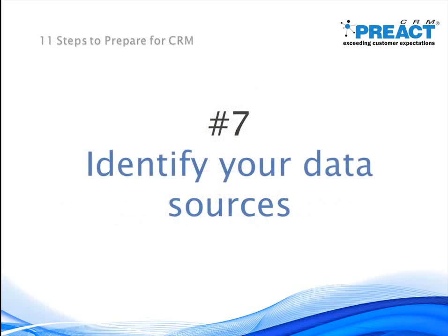Step 7. Identify your data sources. In our experience, by far and away the biggest cause of project delays is to do with our customers consolidating data ready to go into the new CRM system. It's very common for people to underestimate how long this exercise can take.